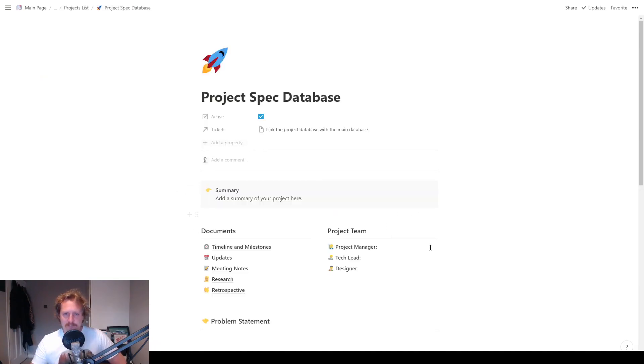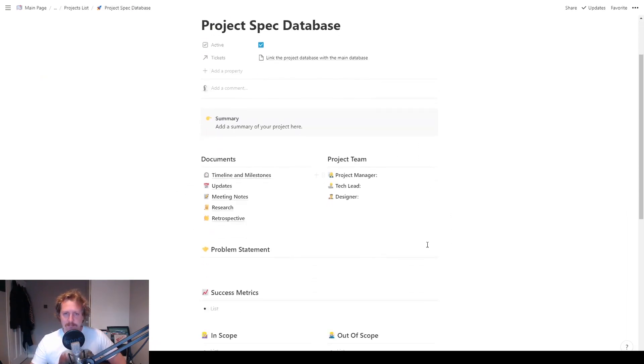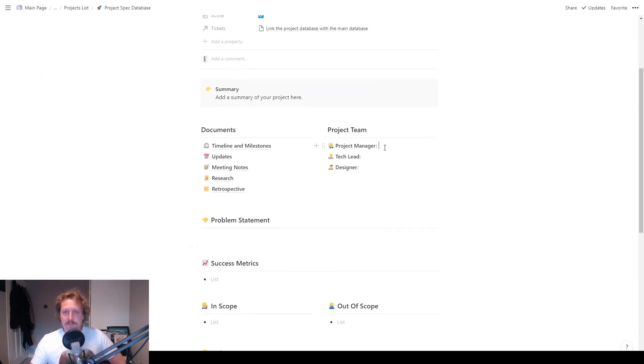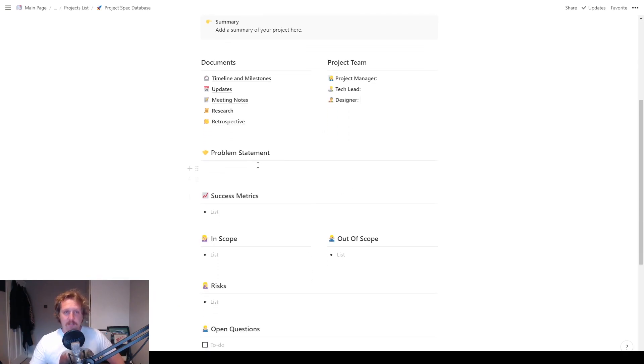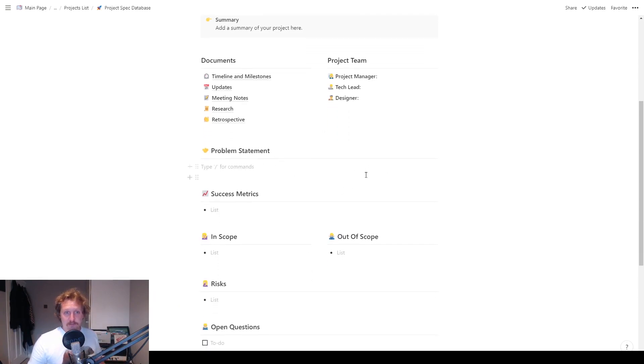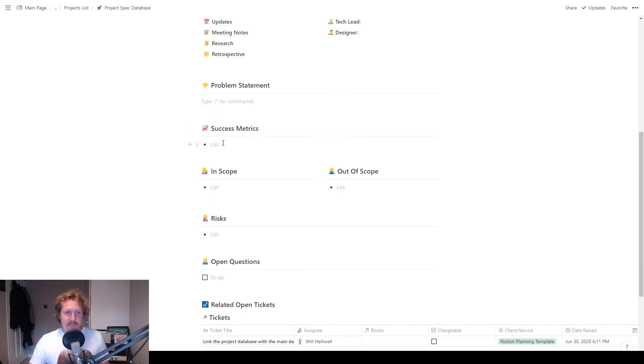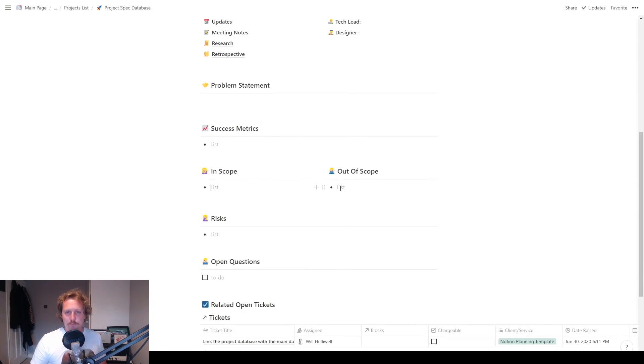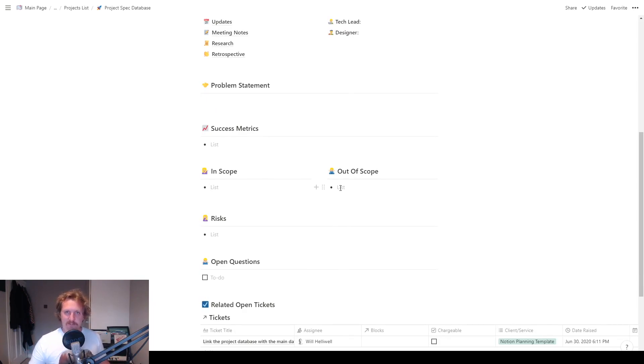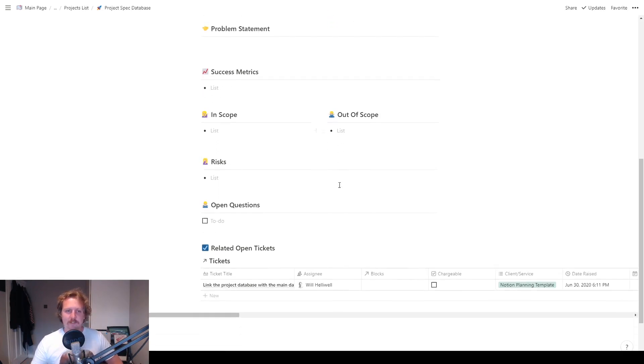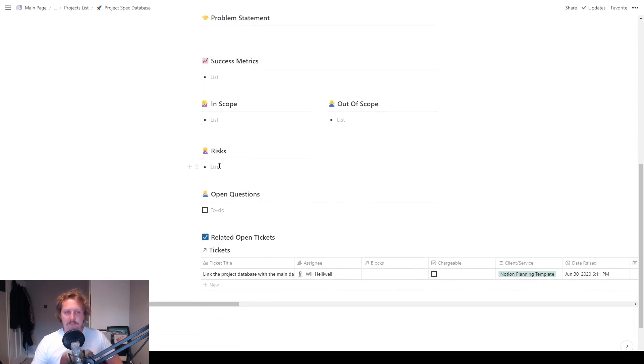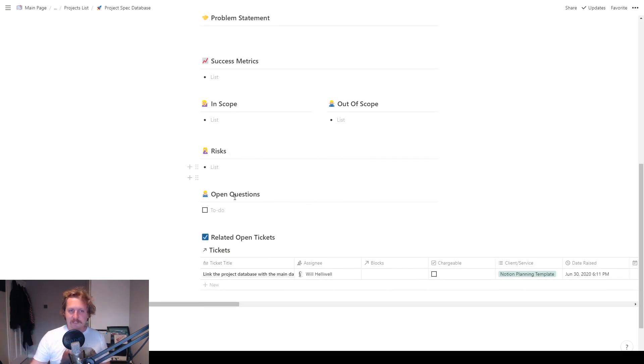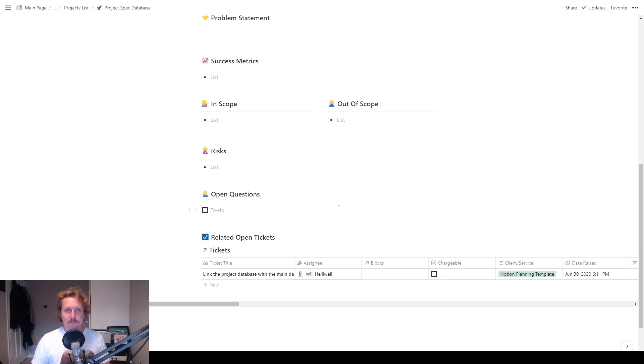Let's go back to the project spec. So you've got your team, you just pop it on there. Add any more stuff you might need. Problem statement, why are you doing this project? Success metrics, how will you know if the project is successful? What is in scope? So what are you going to work on right now? What is out of scope? So stuff that would be nice to have, but you're not going to do right now. A bit of risk management here. So what could possibly go wrong? And then just any open questions about the project, and then you can tick them off when you're done with them.